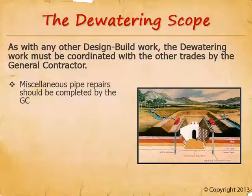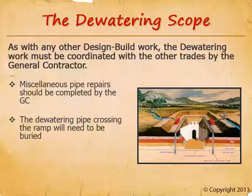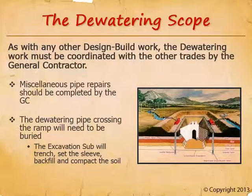Miscellaneous pipe repairs should be completed by the general contractor. Dewatering systems are cheap, flimsy, made of PVC, and pretty easily breakable — but for good reason; there's no reason to spend more money than necessary on these temporary systems. But this PVC is going to break, and when it does, it needs to be fixed quickly. PVC is really easy to patch, so there's no reason to spend $500 or $1,000 to have a dewatering subcontractor send a guy out to fix it. The general contractor should just keep a stock of materials on site and have their laborers fix the breaks as they occur. The dewatering pipe crossing the trucking ramp will need to be buried. Most dewatering pipes are typically installed on guardrail posts around the excavation, but the pipe across the truck ramp needs to be buried. Because dewatering subcontractors don't usually have backhoes on site, the excavation sub will usually trench, set the sleeve, backfill, and compact for this buried pipe — they just need to be directed to in the bid instructions.